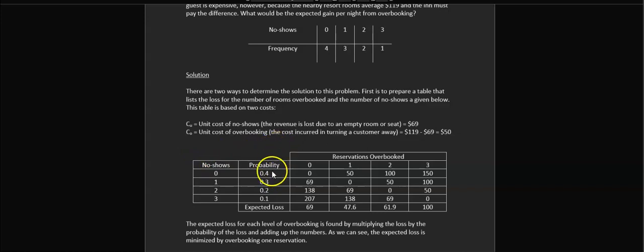But say a 0.8, a 0.7, a 0.5, a 0.3, and then you multiply those out times the 100K and you add it up, and the net factored risk becomes the amount of money that you need to keep in your management reserve. So this method of overbooking analysis really is exactly the same as risk management and net factored risk for management reserve purposes.